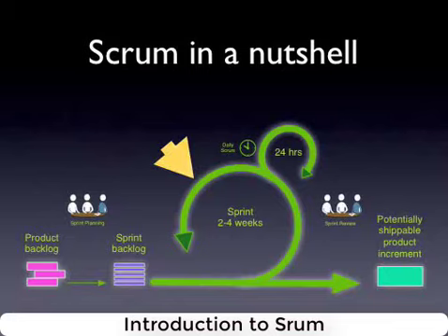The product owner can alter the product backlog, they can put new stuff on the product backlog, they can change the order, but the next time anything will be taken from the product backlog will be at the beginning of the next sprint, unless the team finishes all the work that is to be done before the end of the sprint, and they feel they can take in something more.